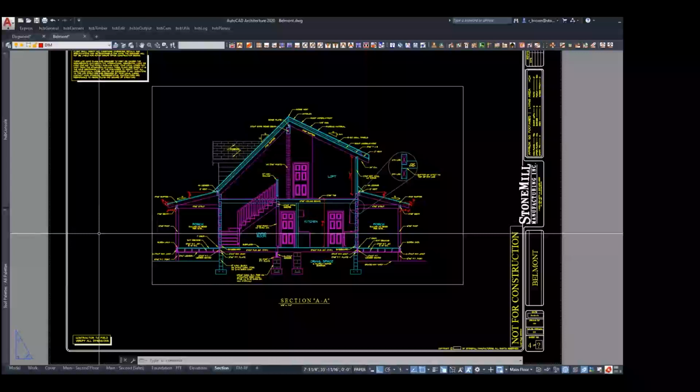We'll say, like, when do you want to be in the home, or when do you want to break ground? And that way that gives us all the proper sense of urgency. So, okay, I want to break ground next spring. Well, then we already need to be getting your plans wrapped up in a couple months so that you can go out and get your permits, get people lined up to start excavating, all that kind of stuff. There's a lot of moving parts and pieces, and the short answer is it's an ongoing discussion based on your timeline.